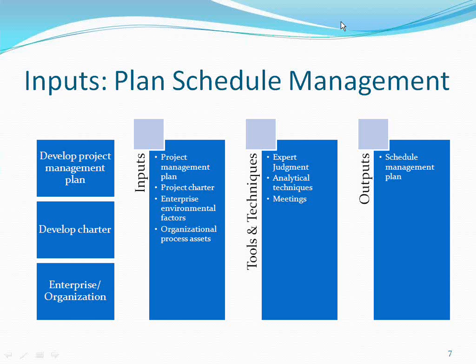If you want to develop the schedule, first you should know what is the scope of the project you are doing. If you are constructing 1 kilometer of road, the schedule is different. If you are constructing 50 kilometers of road, the schedule is different. So without knowing the scope, what is the work you are going to do in the project, it's difficult for you to estimate the schedule. So scope baseline is the most important document in the project management plan when it comes to scheduling.